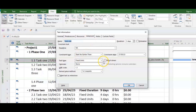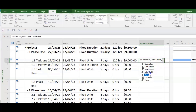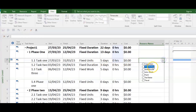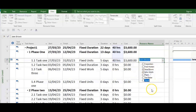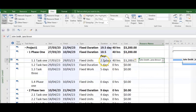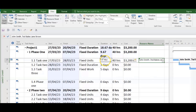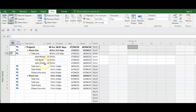Going into View and Task Usage, what has happened is MS Project — because it's not effort-driven — has given each person their own 40 hours of work. So let's change Fixed Units to effort-driven and click OK. We'll remove all the assigned resources by unclicking them. Now it's effort-driven. We assign Jane — 40 hours. But what is significant is duration has reduced, because it's assumed that if you're adding resources it's because you want to reduce duration. When I assign Ted, duration has reduced further and the work has remained the same. Going into Views and Task Usage, we can see everybody has gotten a portion of the 40 hours.